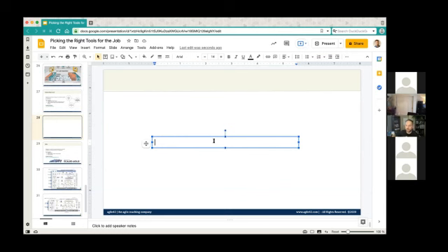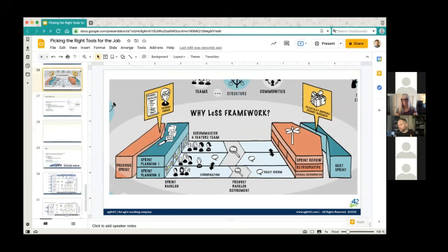So to create that, you say, oh, it would be great if we can do this, but this is why that's not going to work with a front end back end split. Now, I have a vision of the future. That's no problem. Concrete first steps. How do I actually get there? Might be something like borrowing some of these ideas from LeSS. Hey, let's have both trains do a collaborative PI planning. So we're each going to have our own things that we do on our trains, but because we do that PI planning together, we know what we need from each other as we go. And so instead of us working side by side or one after the other, we're going to work in lockstep and constantly communicate back and forth with each other, right?